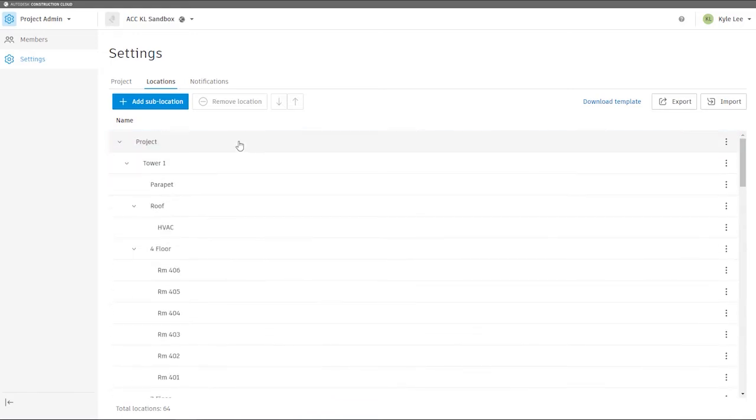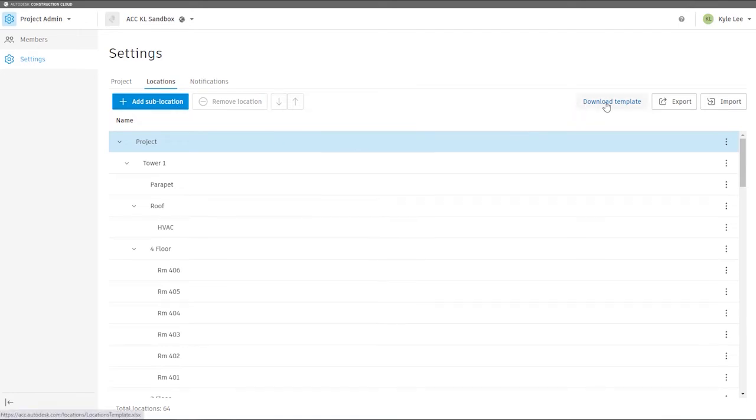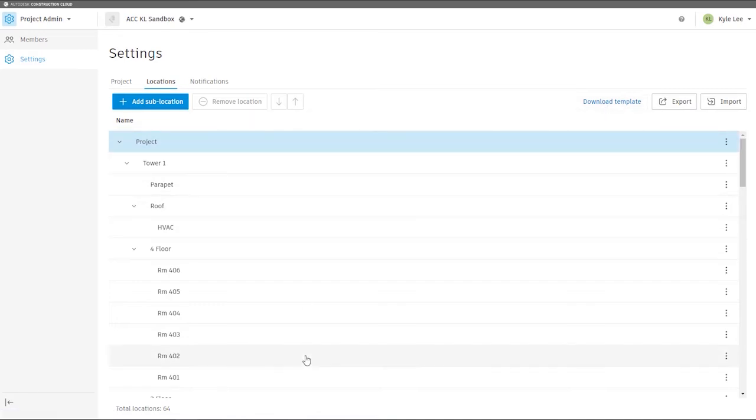We do have the ability to set up locations manually, or we can download an Excel template file that we can populate and then import to create our locations for the project here as well.